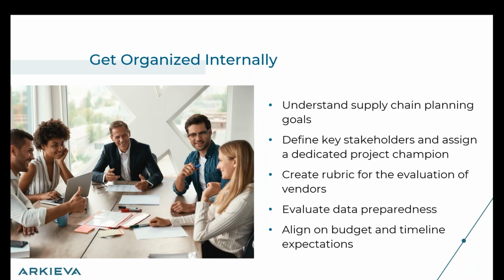But timeline is also very important. Sometimes companies will have a notion of a particular timeline they want to hit. Maybe there is a season. Maybe Christmas is very important to your company. And so September onwards, life is crazy. So in order for you to be going live before September, you may want to back calculate and say, we want to at the latest start the project, let's say June. And if that's where you decide, then knowing that timeline expectation and making all the vendors aware of it is also then very important.